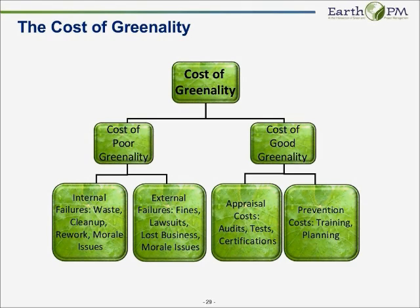The risk register for the BP cement well included precisely zero environmental and safety risks. That's shocking to me. I hope it's somewhat shocking to you. Lots of operational risks, lots of monetary risks. So even with BP at the ideation level being focused on changing their logo to Beyond Petroleum and trying to become a green company, at the project manager level it did not filter down.